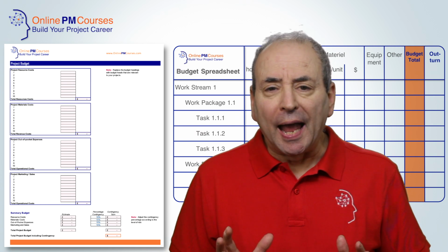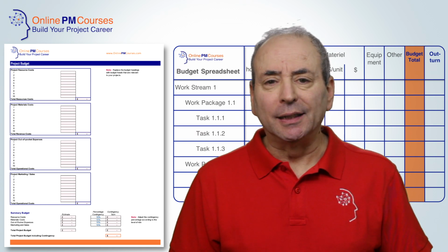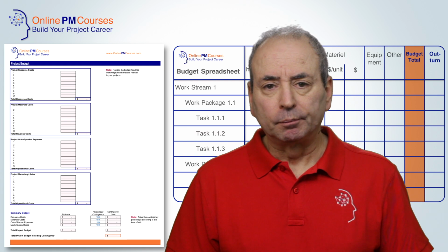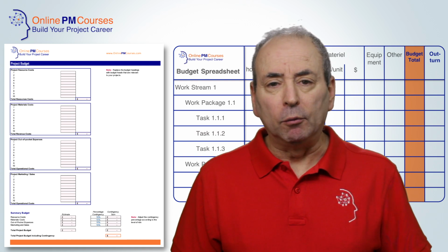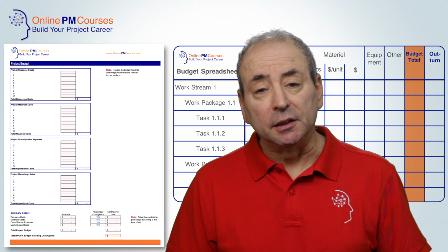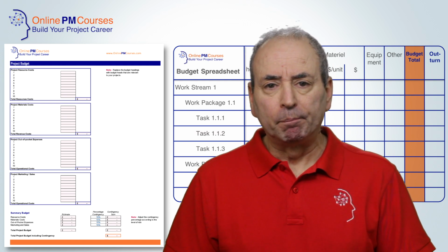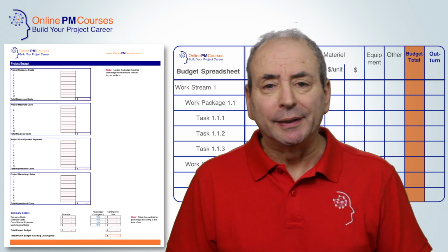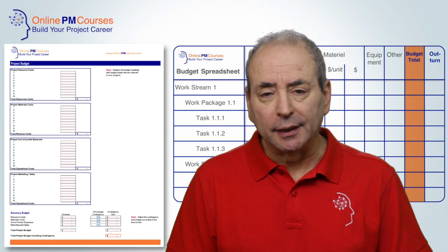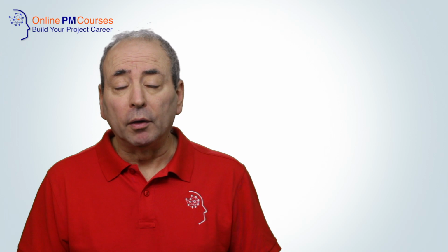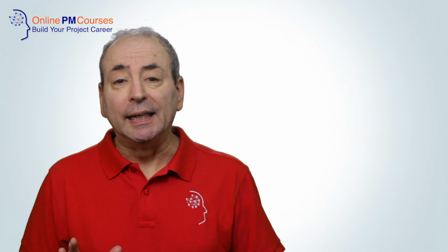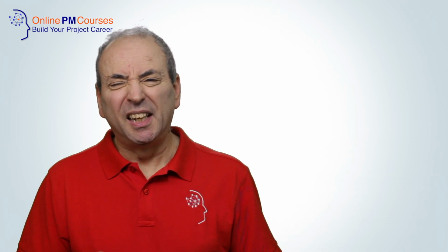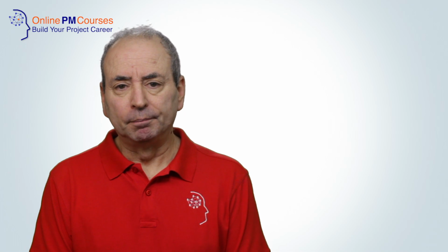Once you've got down the headings for those, you can put estimates against each one. For some of these headings, there will be a range of different expenses that you might anticipate. It's very easy to build a template for this and to adapt it to each different project. This is not a rigorous approach, but it does work well, particularly for simple projects.